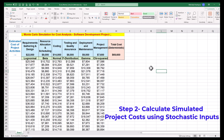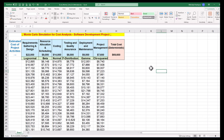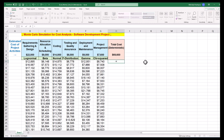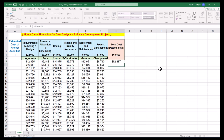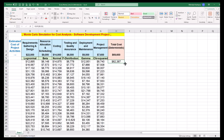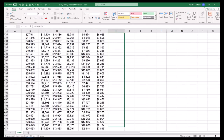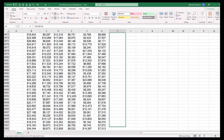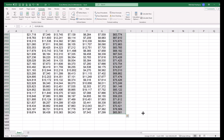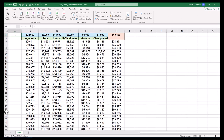Step 2 is to calculate simulated project costs using stochastic inputs. Click on the relevant cell, press the equal sign, and use the SUM function in Excel to add up non-deterministic cost estimates of the six activities defined by their statistical distributions. Click and drag down to find 5000 non-deterministic estimates of total project costs. A large population of cost samples offsets the effect of outliers or extreme cases in the data. This concludes step two.